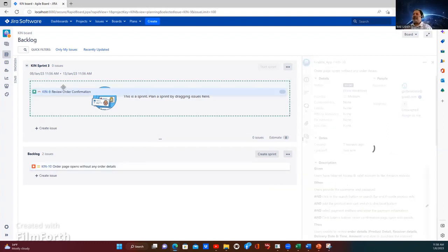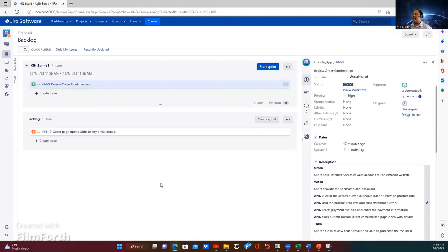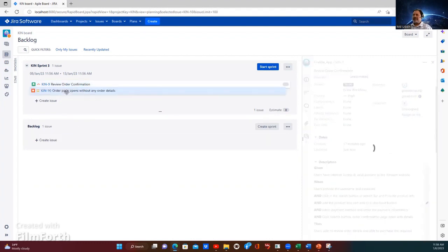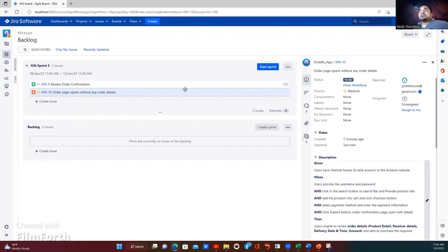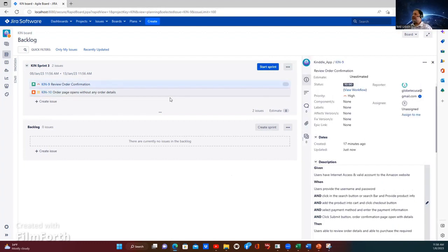So we can create this on the sprint, and while you're doing that, we found the bug, right? So it will go in that same sprint. Okay. Because we found the bug while working on that story. The sprint didn't end, so we can work on that bug and fix it, and then close the sprint. Or if there is no time, then this bug will go to the next sprint. Carry over.